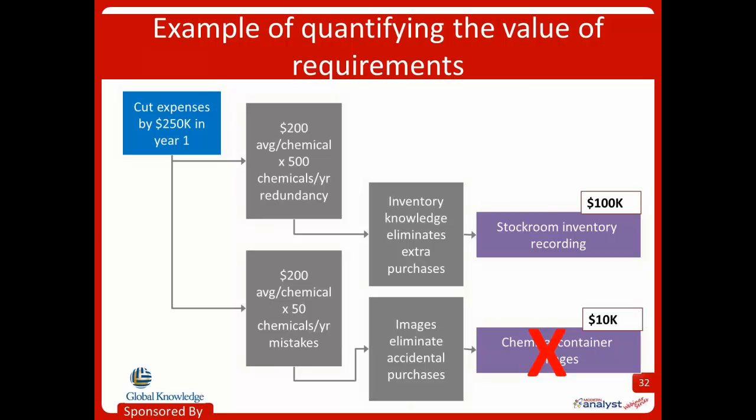Now the stockroom recording feature, let's analyze that one. We're going to take it from right over here up to the left, right? So the stockroom recording requirement helps contribute to our business objective because if the lab assistant knows what's in the stockroom, they can avoid buying chemicals that are already in stock. Now, maybe our data, and we have to have this data in this case, says not buying chemicals that are already in stock saves on average $200 per chemical, right? And we know that last year we bought about 500 chemicals that we didn't really need. They were actually in stock. So we do the math of 200 times 500, and we end up with our benefit over here on the right, okay? So I am absolutely doing simple math to get there.